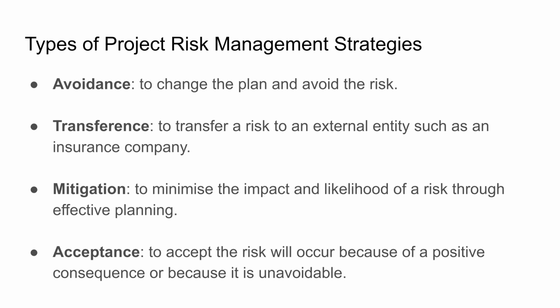Mitigating risk is a plan to minimize the consequences and likelihood of events occurring. This is desirable where risk likelihood is unknown and mitigations can be effective at reducing risk impact. Accepting risk is undertaken when a risk cannot be avoided or transferred and designing mitigation strategies is unfeasible. A risk will also be accepted if it has positive consequences where it will become an opportunity. In the event of risk acceptance, it will be monitored and managed if it occurs.